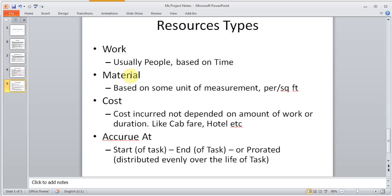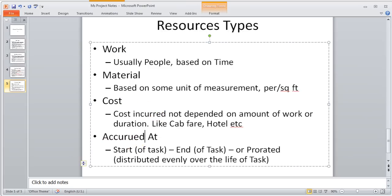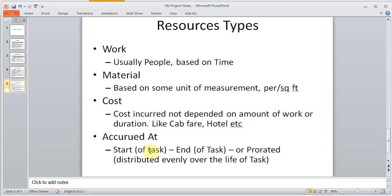Work is where it's individuals, hourly work and things like that. And I think I've got a PowerPoint slide for this. So work usually means people, like based on time. The material type is based on a unit of measurements. So it could be per square feet, or usually like for one tile, for example. Or paper will be ten cents a paper. Costs are incurred which are not dependent on amount of work or duration. So it's like a cab fare or a hotel stay. And these costs can be accrued at either start of a task, end of a task, or prorated, which is distributed evenly over the life of the task.